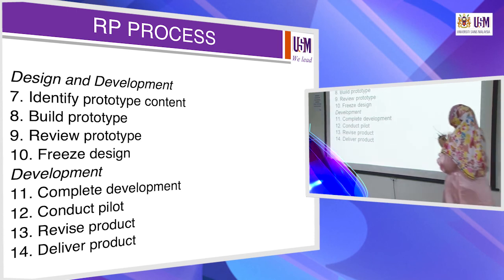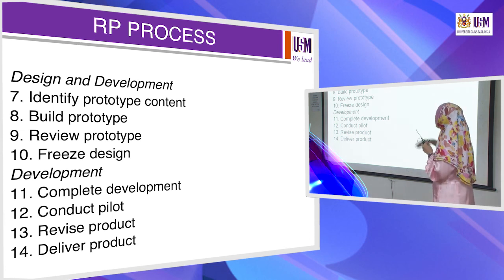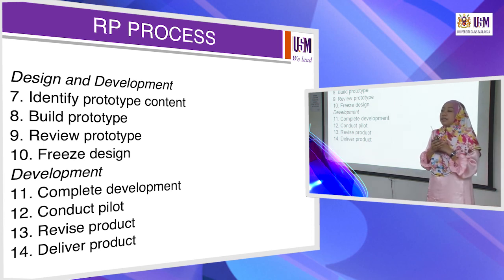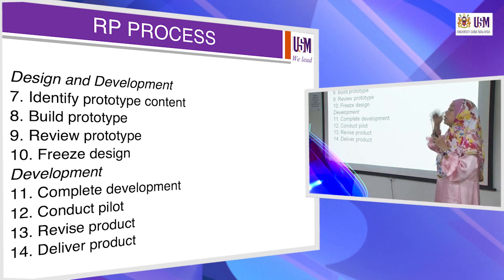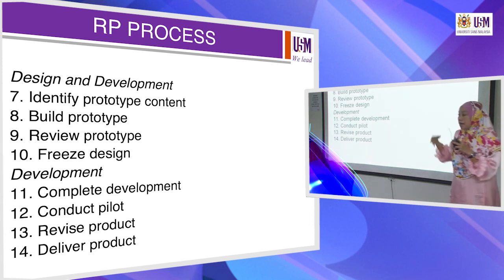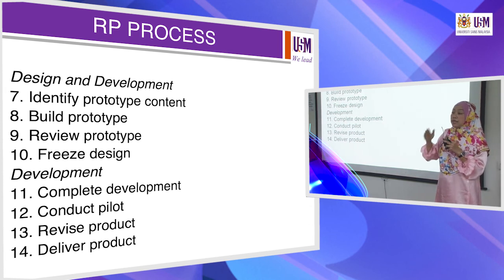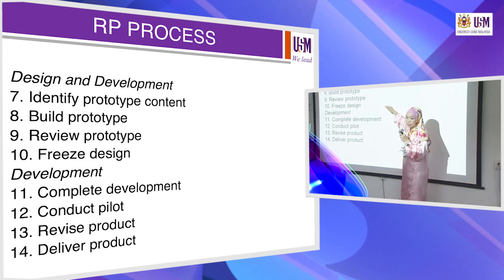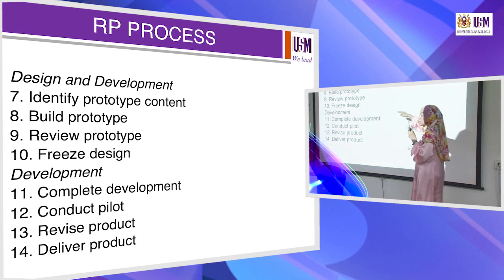And then we build the prototype. That is where we do the seminar. And then we review the prototype and freeze the design. When we have already decided that this is the best agenda that we can do, that there will be no problem in doing the agenda, and you have considered all the risks that you are going to encounter during the seminar, then you say this is the final decision that the committee has decided, and then we freeze. Stop the agenda. You already decided, then it's development time.